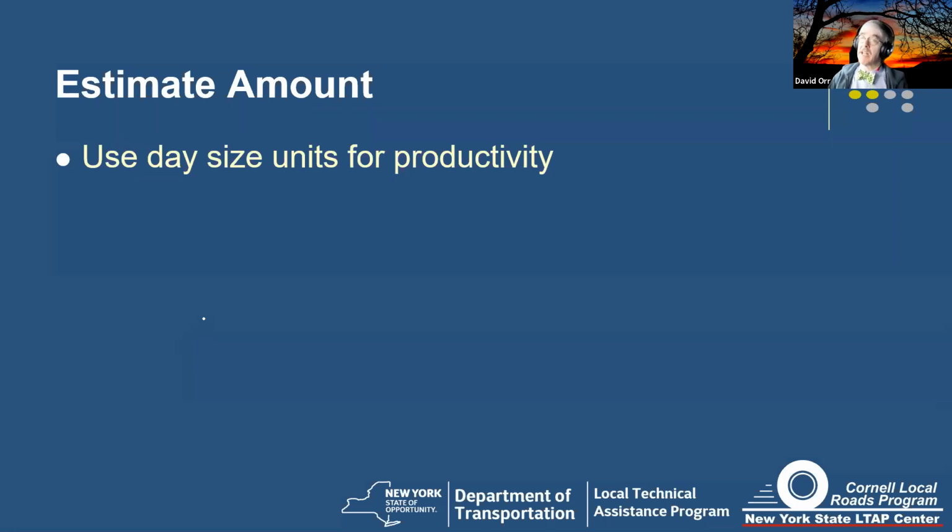It allows you to deal with weather. That actually is a good point. If you've calculated day size units, then you could sort of estimate, I lose a day due to weather here and there, and do an overall calculation by dealing with that. Keeps the numbers smaller, so that rather than the whole project, they can break it down. Yeah, that's a good possibility.